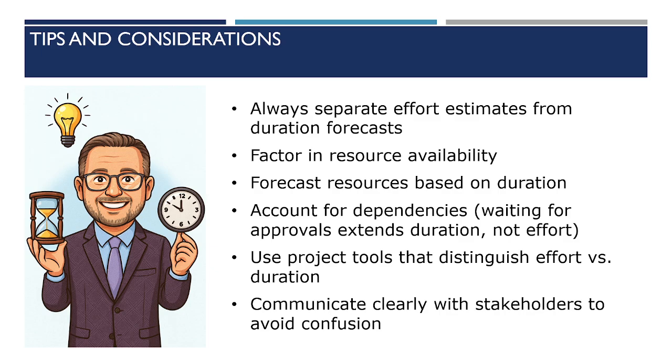And so here's some things to think about. You want to separate the effort estimate from duration forecasts. So you can ask people how much effort it takes to do something, but also ask them how long. And you want to factor in their availability. Well, are you working on this full time or part time? Do you have other things? And we won't even get into the fact that the math generally doesn't work the same, that a half-time resource takes twice as long, because generally they're working on other things and they're distracted. So I would actually argue sometimes it takes longer than that if they're a part-time resource, but we'll save that for a different conversation.